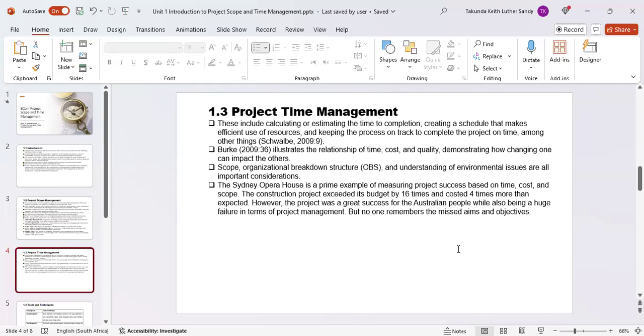The moment the budget is cut by the funders from 10 billion to say 7 billion, you are going to forego some of the work, some of the scope that you would have come up with initially, because there's no budget to foot those other things. So these things are interconnected and they affect each other. That's what they are saying there.